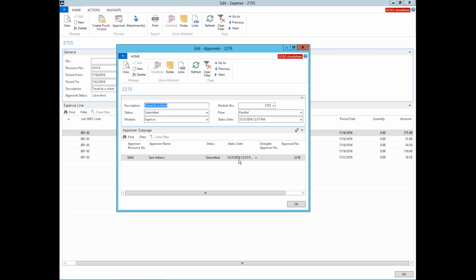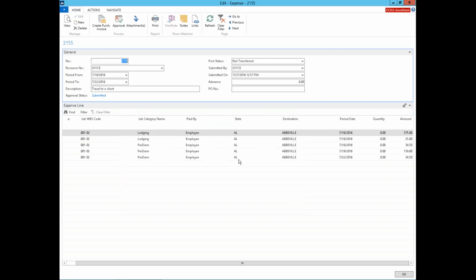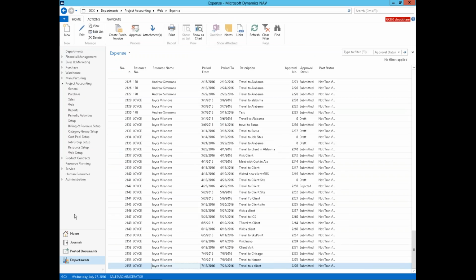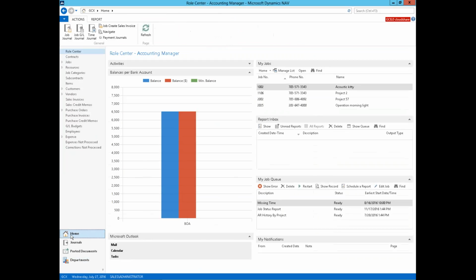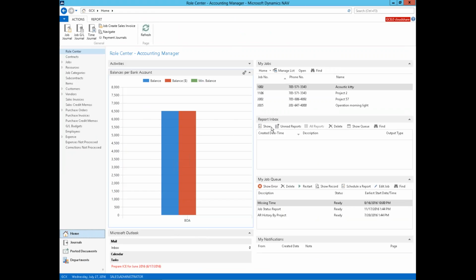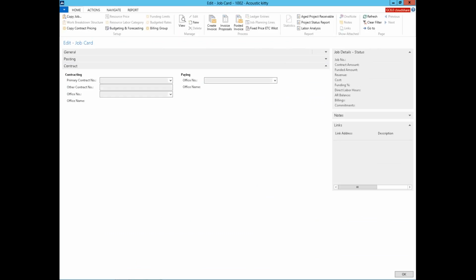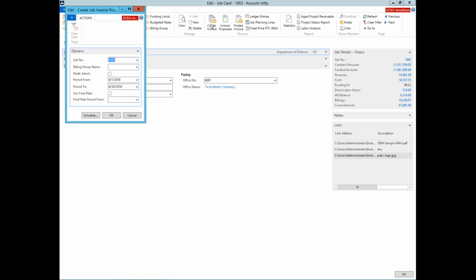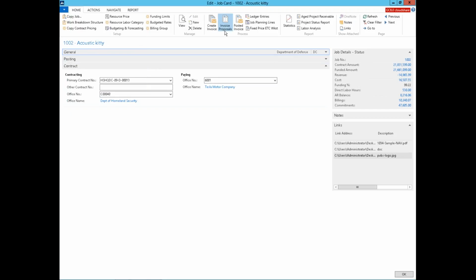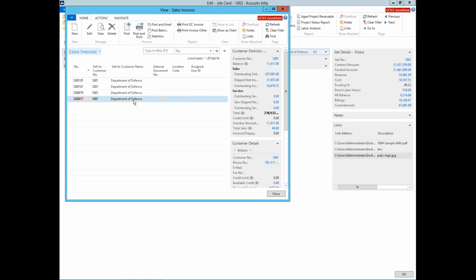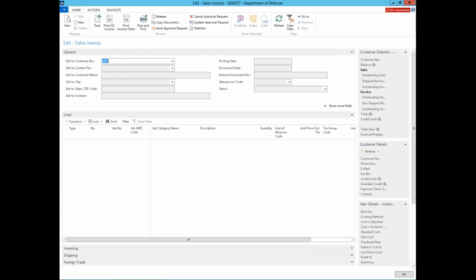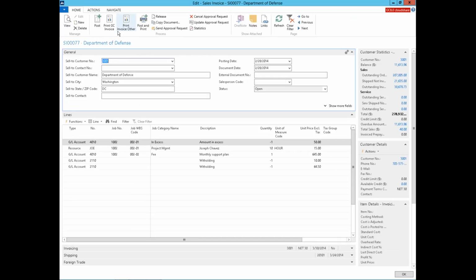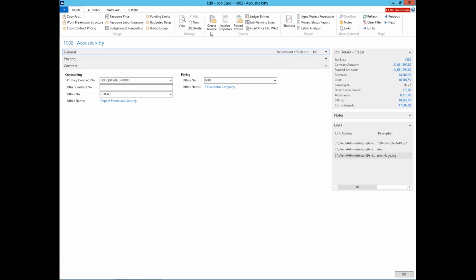So obviously there's lots of stuff to cover. The last thing I'm going to cover, and then we'll have time for maybe 2 questions, Damon, is just how I generate invoices. And the process is you just run the function to create an invoice. Also can do invoices based on final rate. It creates an invoice proposal, which is like a pre-invoice. And this is where somebody can review it, make sure it's accurate.